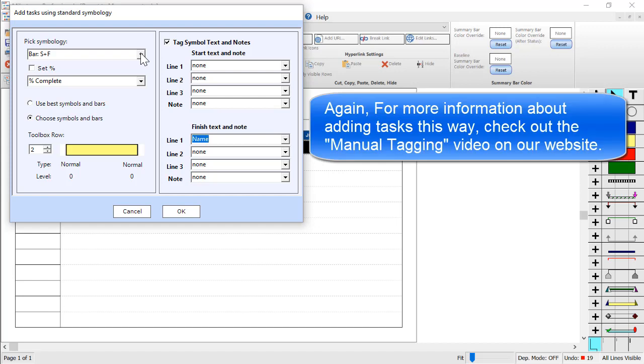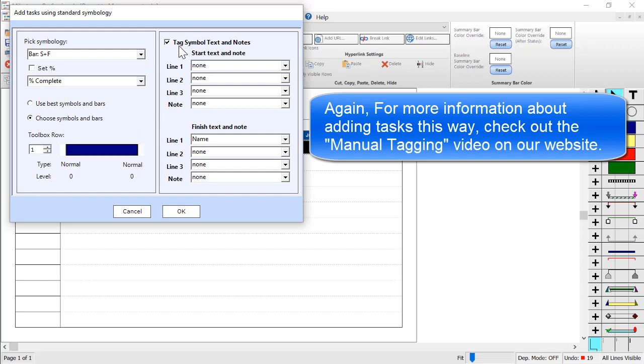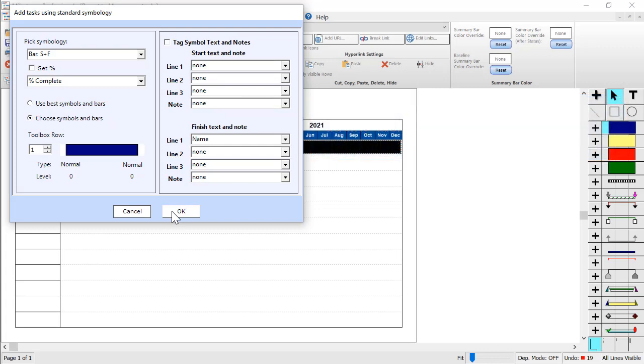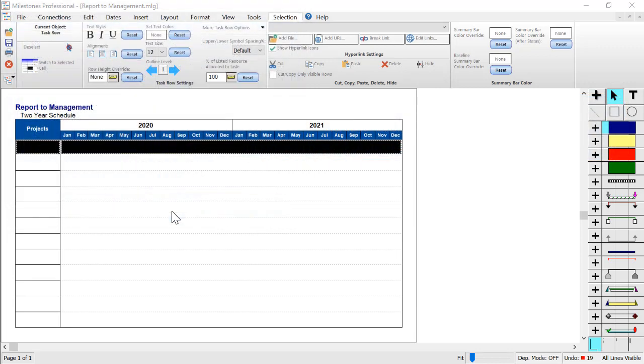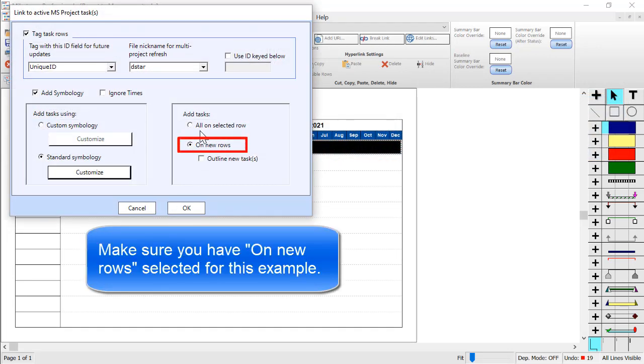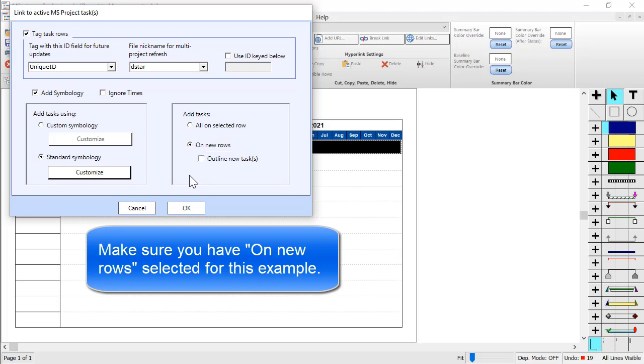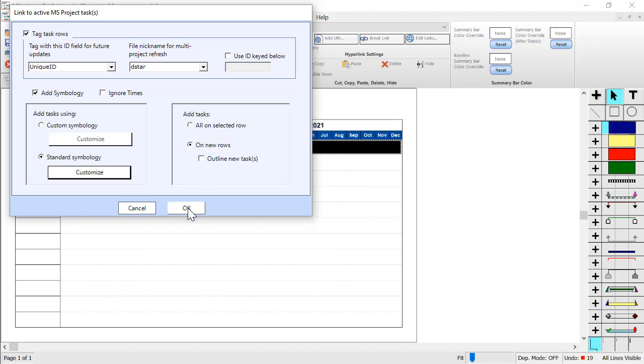Then I will customize the standard symbology by clicking Customize. And then I will use Bar Start and Finish - I'll just bring in the gantt bars for these tasks. And then I'm going to choose my symbols and bars and for these tasks I will use blue bars. Those look good. If you want symbol text on your symbols you can check this Tag Symbol Text over here. If you don't, you can just uncheck that and it'll ignore any of these settings here. So I'm going to press OK. And make sure you have On New Rows selected over here. That way it'll push each task on its own separate row. And then I'm going to press OK to get that symbology over to Milestones.